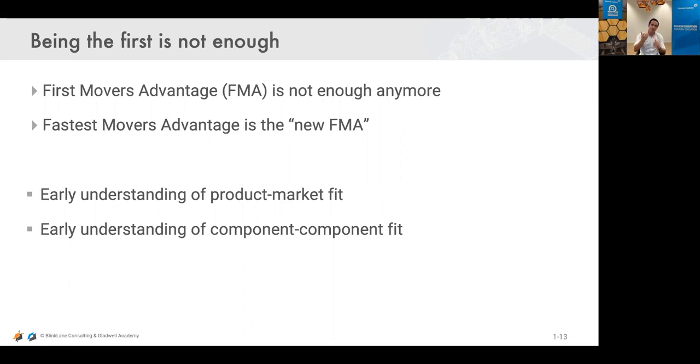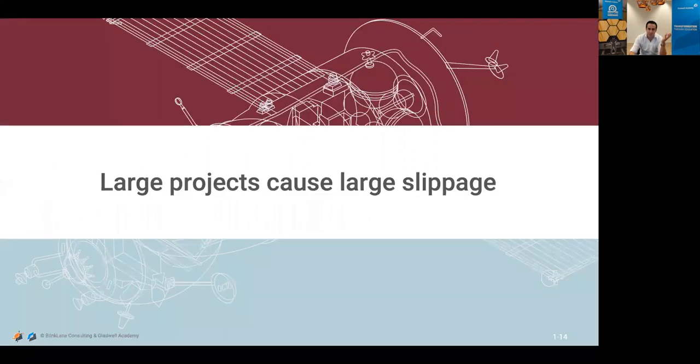So the practice is essentially secondary. Trying to look at the whole value stream, that's primary. So essentially, we're trying to create small projects, because a small project is something that is more overseeable. It's better to plan. We know what needs to be done, and larger projects have a larger slippage. We tend to over plan that. We don't really know exactly what needs to be done. It's just maybe too much. And therefore, the risk exposure in larger projects is just larger.